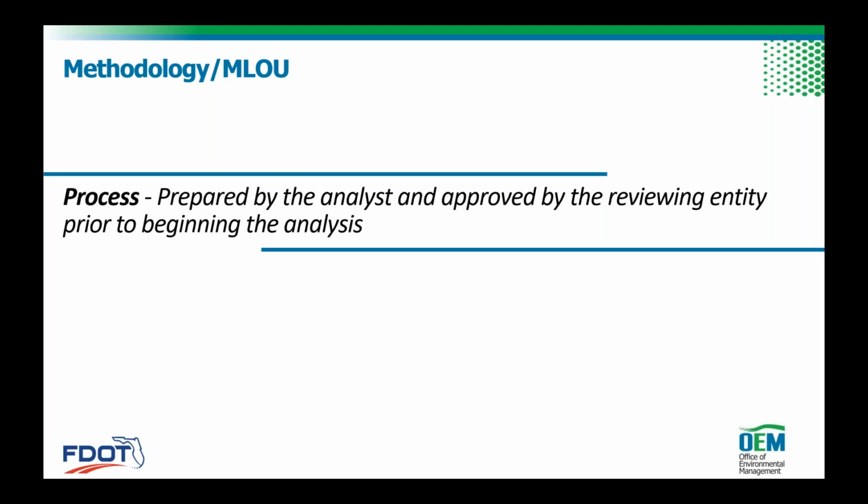But one thing that we've noticed when reviewing many PTARs, without this review or without a very well-defined methodology letter, is that there can be misunderstandings that have led to some major differences between what the PD&E manual or PTAR requirements are and how the analysis was conducted. One of the issues is some of these major differences can lead to the need to completely redo major task elements like forecast models, or even require additional data collection. Since these are like step one in the process of traffic analysis, we understand that having to make these comments can sometimes lead to major schedule or budget considerations.